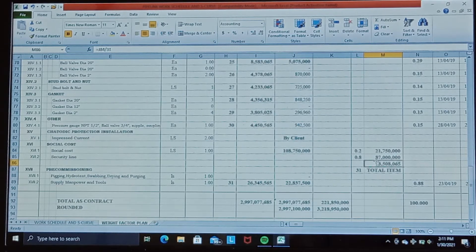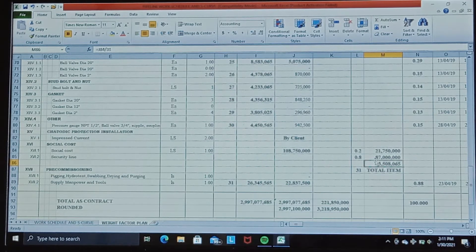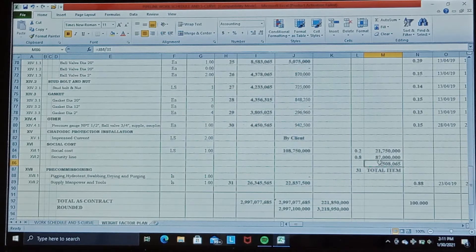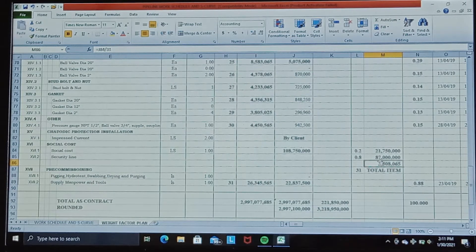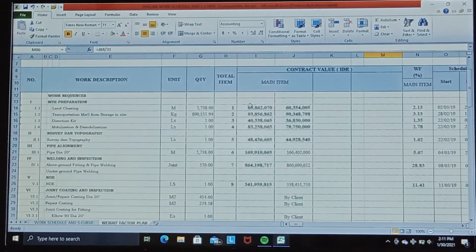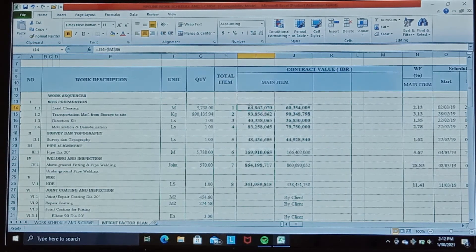We specify direct work only, but we still take into account the price of indirect work and distribute it across each total direct work price — such as social cost. The social cost and security line totals 108,750,000 rupiah. We divide this amount by the total 31 direct work items, giving us 3,580,065 rupiah per item in cell M86. We add this amount to each direct work item price.